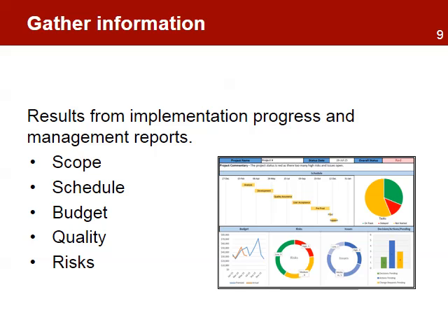The management reports also provide information on the general status of the implementation of the project. This information includes the progress on activities, such as how many were completed to date, the project schedule, asking if the project is late or ahead, and the project budget, with information on the resources that are available to complete the project. Additionally, the management reports include information on team and stakeholder management, information on risks and issues, and a status on change requests and approvals. This information helps identify the efficiency of the project in achieving the planned results.